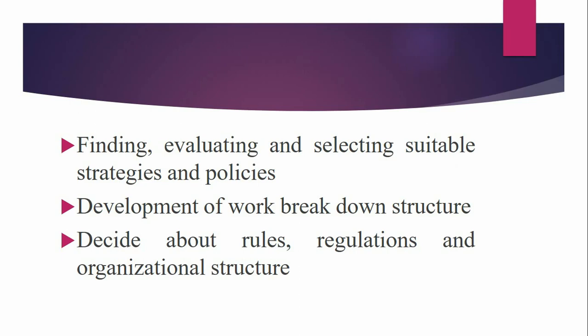After it, we will develop a work breakdown structure. We will divide the big work or the whole project into smaller pieces or smaller activities, and for each activity, we will decide how much labor, financial, and physical resources will be required for each and every activity.